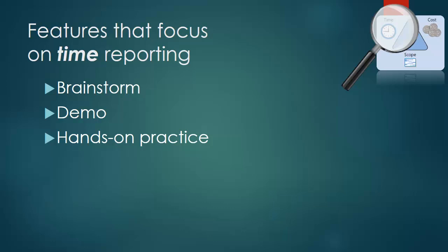Resource assignments? So I might care about resource assignments in terms of what? How much they're allocated? Yeah, allocation, availability, over-allocation. So if anyone here has used the awesome Level Resources feature and you didn't like the end result because it pushed out your project finish date, it was solving a time problem, wasn't it? It was properly allocating resources, which required more time than you would like to give to those resources. So yeah, I would say that's a fair time-related feature as well.